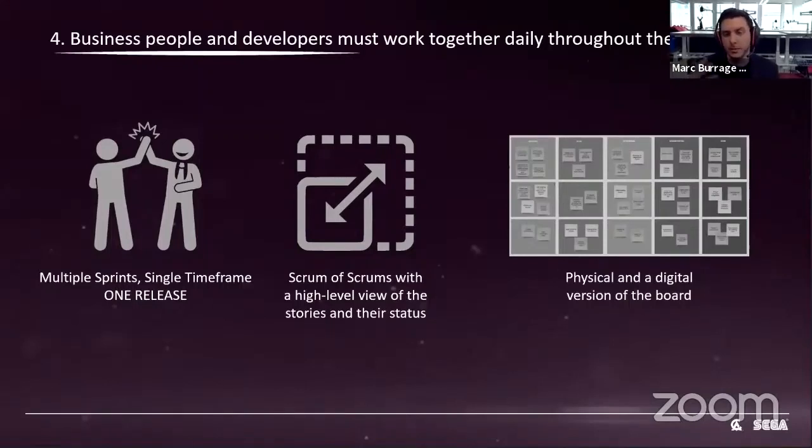board. So again, rather than having to go around each of the teams and say, I need to know this, I need to know this, I need to know this, you could just go to this board and see this really clear visual representation of how a particular patch was going, because you'd have to do, in progress, blocked, done, and you could just see throughout the course of the 2 weeks things progressing across the board, and it was just a really nice snapshot of where things were going. So the main takeaway from this point is just regular communication and make sure that it works for the people that you've got within the team.